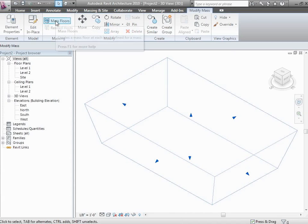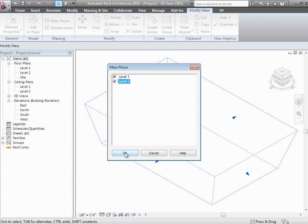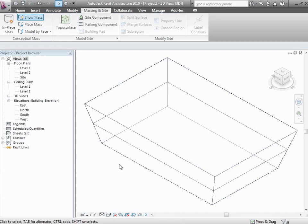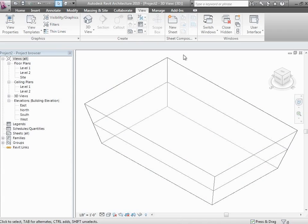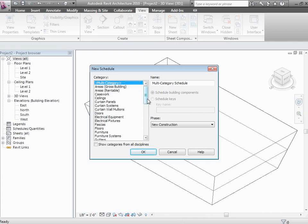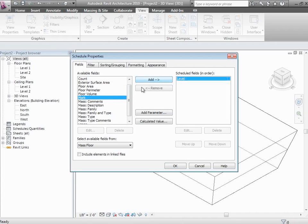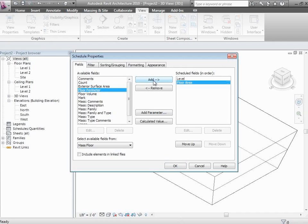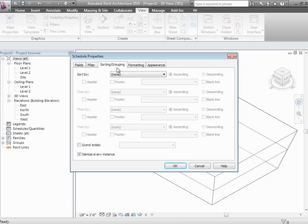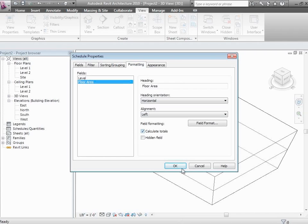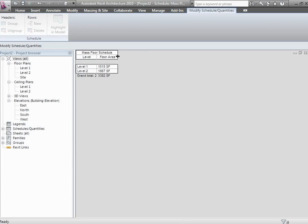That's some volume of space — hopefully about the volume I wanted. My second step is to divide it into mass floors. A mass floor is really just subdividing the volume into different levels so I can report out the square footages. I have two mass floors — the lowest level and the second level. Even at this point, I can construct a schedule that tells me the square footages and start applying costs. I'll go to the View tab, create a schedule of mass floors, report on floor area, perimeter, and volume, and put a total at the bottom. Not too bad — 3,300 square feet. That's a pretty good guess.